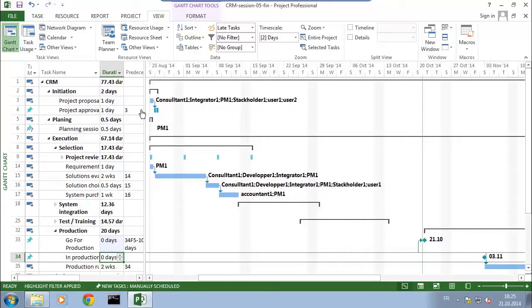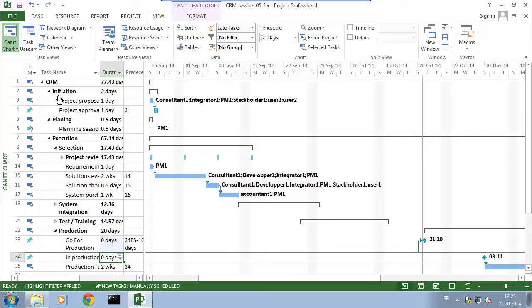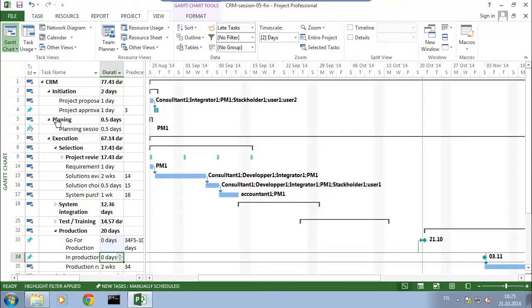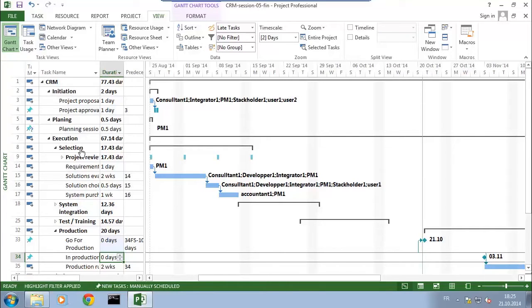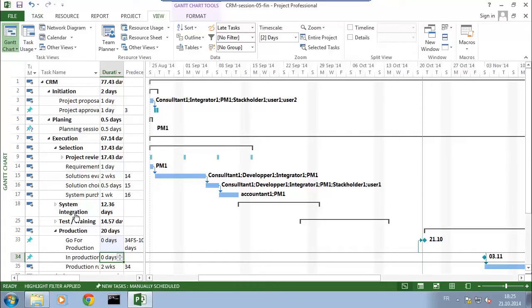So I'm back here to the CRM project, which has a first set of tasks for initiation, a second set for planning, and then the execution phase where we do the real work. Execution has selection, system integration, test and training. Once all that is done, we'll go to production.